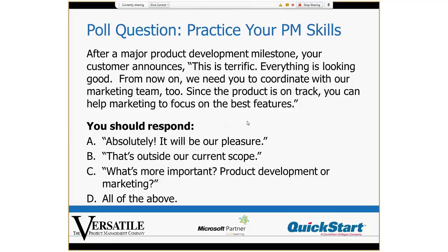And so what does that mean, right? If it's outside the scope, it means if I take that on, I'm either going to add money, add effort to the project, maybe even delay some tasks that I'm working on now, so I hope that wouldn't impact the deadline, right? And so then I've got to come back to them and ask, what's more important for the resources we have assigned?